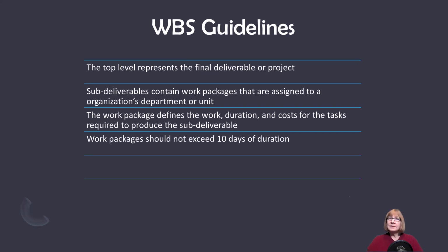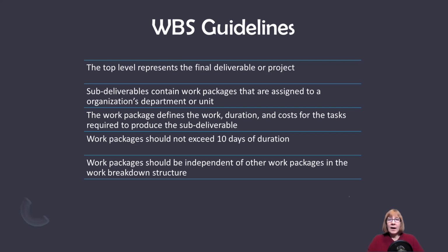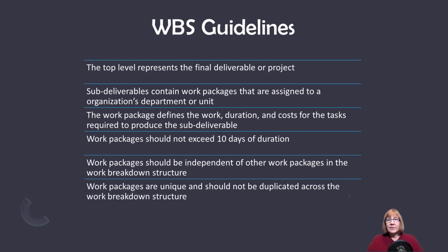Something that's a nice little rule of thumb, not hard and fast, but a rule of thumb, is that work packages shouldn't exceed more than, say, about 10 days. They should be independent of other work packages in the work breakdown structure. And they should be unique and not duplicated across this.